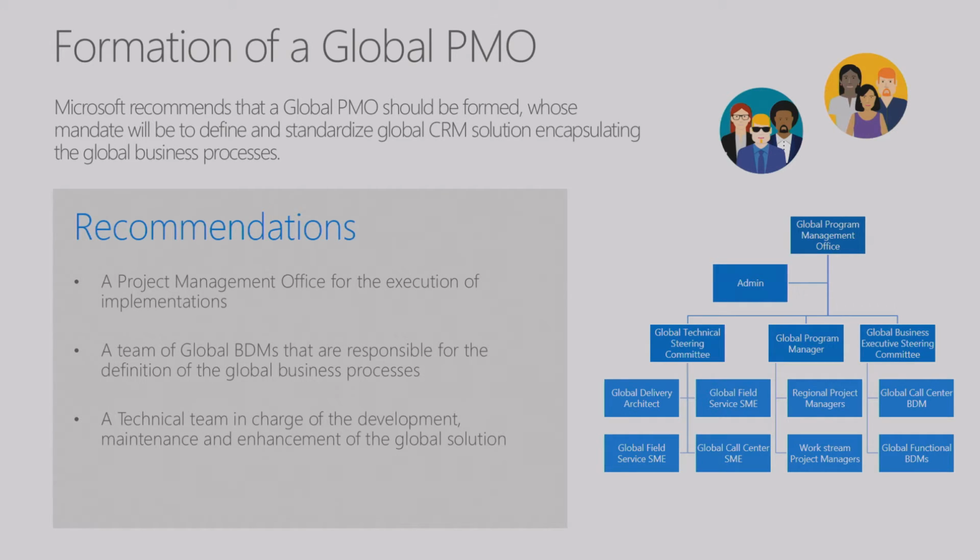And this is just a sample of what the PMO looks like that we have formed for one of our customers. As you can see, you have the global program management office, a technical steering committee, and a program manager at the lower level. You have some architects, you have some SMEs. And because we're dealing with call center as well, we have call center SMEs and different work streams. So at the end of the day, this project becomes a pretty big program for this customer that we are working with.